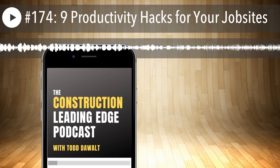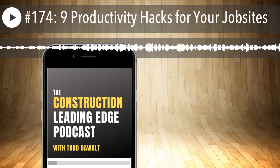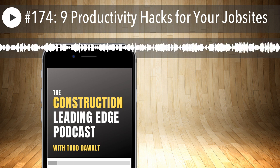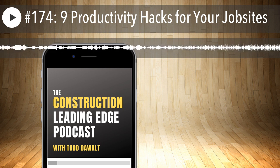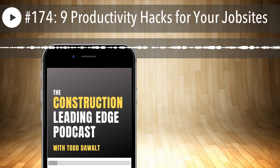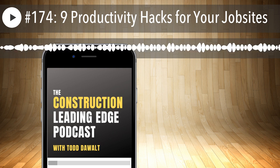But the idea is take a picture of a proper installation. This is what it should look like. Point to the details. Maybe even take a picture of a wrong installation, put a red X on it. So if you have specific issues where you're having problems, take a picture of it, point to what's right, point to what's most important, show people what it actually looks like when it's done. And you can make those available to your crews.